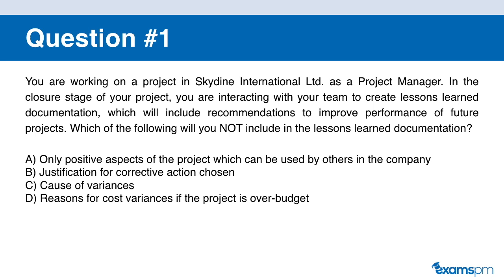Let's get started. You are working on a project at Skydine International Limited as a project manager. In the closure stage of the project, you are interacting with your team to create the lessons learned documentation, which will include recommendations to improve performance for future projects. Which of the following will you NOT include in the lessons learned documentation? A: only positive aspects of your project. B: justifications for corrective actions chosen. C: causes of variance. D: reasons for cost variance if the project is over budget.